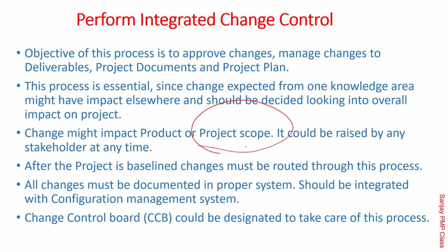Yes. So don't forget the project scope. Project scope is also important. Finally, for that you need to make an investment, and investment is of two kinds: money and time. Even time is required for that, isn't it? So your WBS should reflect activities which are related to the project. If taking an interview for a certain special skill needs time and money, you need to consider that in the plan. Otherwise, on paper, what looked like a very profitable project, because of project scope related activity became not so attractive. Correct? Right. That's the difference between product and project. So both are equally important.